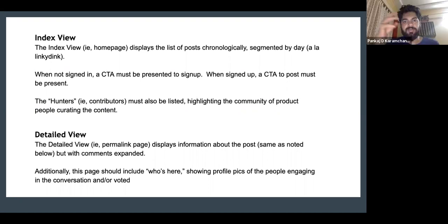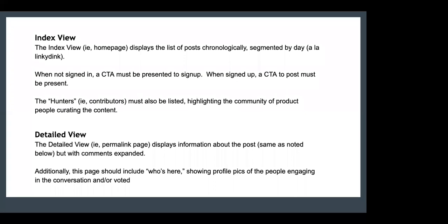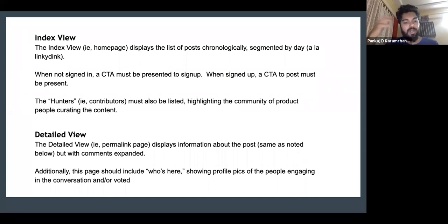Yeah. So see, when you're doing sprint planning, say sprint 2 is ongoing and you need to come up with features or tasks for sprint 3, which is 2 weeks away because sprint 2 has just started. In these 2 weeks, you will have to figure out any wireframes or features that you had planned. These features need to be designed in mockups.